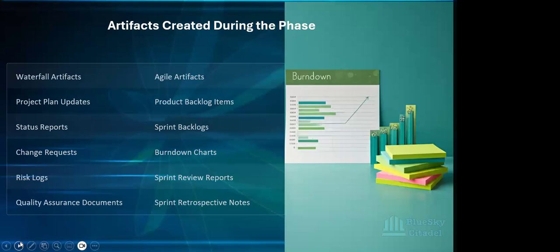You have your burn down charts, which show how the team is burning down, or basically reducing the size of the backlog in terms of the work that has been committed. How are we able to get the work completed within the 2 week sprint? Are we burning down at a good rate so that we can see, as an SM or an APM, that by the end of the sprint we will get the work done that we have committed to?